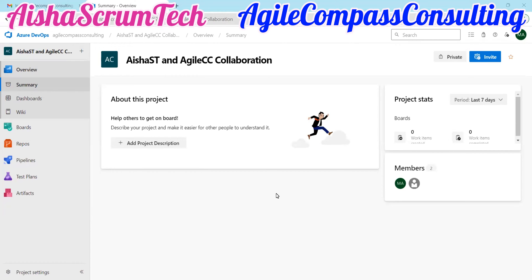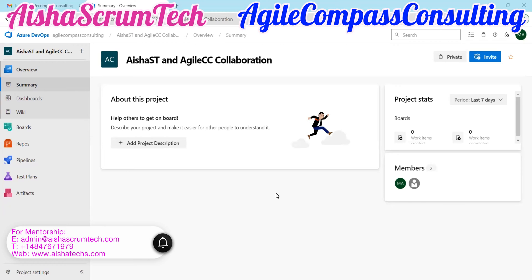It's so different from the way you create a Kanban board in Jira. For those who have used Jira, by the time you're creating the project, they're already asking you: is it Scrum or Kanban? So you're selecting which one. But for Azure DevOps, all you need to do is create that board and exclude the sprint. The Kanban board is independent of the sprint. So let's go ahead to create our new Kanban team and configure the board the way that it works for us.